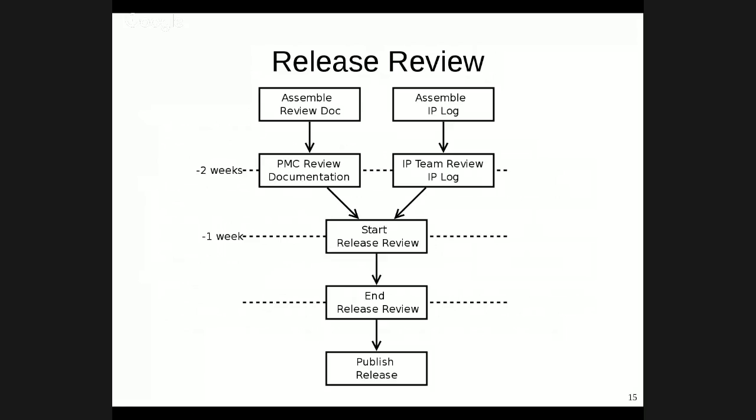Now, I say 2 weeks in advance. We have a little bit of wiggle room, but getting this in early is your best guarantee of being able to release on the date that you choose. Now, we end these reviews twice a month, on the first Wednesday and the third Wednesday. So try to account for that in your planning. If there is a desperate need, we can throw in an extra review period, but they typically almost always end on Wednesdays. And again, I do 2 a month; we consider it an exception to do otherwise.